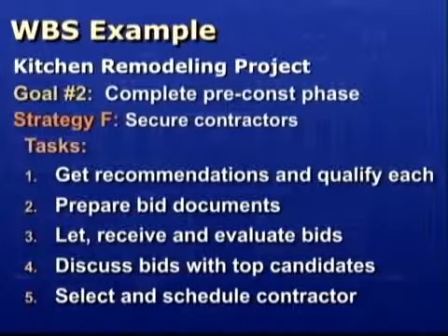Let's zoom in again and look at strategy F, which is securing contractors. To accomplish this strategy, I've identified 5 specific tasks. They include getting recommendations and qualifying each candidate, preparing bid documents, letting, receiving, and then evaluating the bids, discussing the bids with the top candidates, and selecting a contractor and scheduling them for the project.